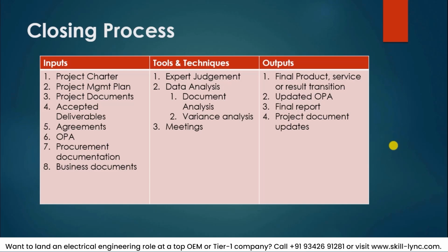This is done all through meetings, and then finally you conclude by specifying the final product, service or result transition from one stage to the other, so that you deliver and conclude that you have attained the given target. And then if required, you update your organization process assets based on your learnings and findings, and then prepare a final report and attach it with all the updated project documents. So with this final consolidation of the information, you close the project.